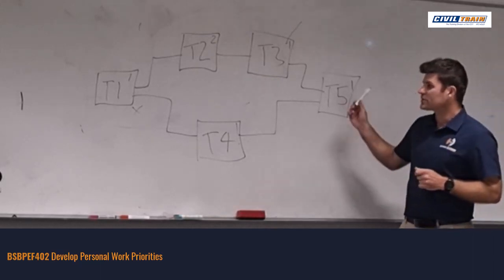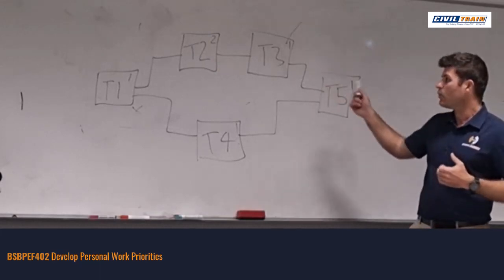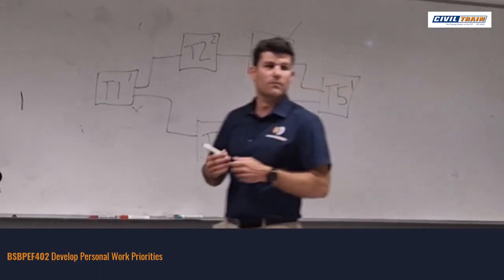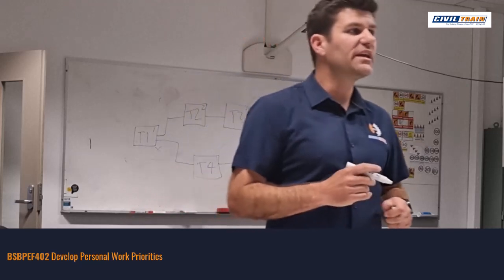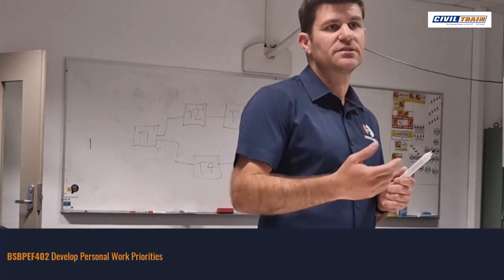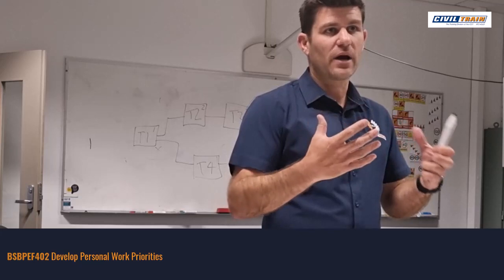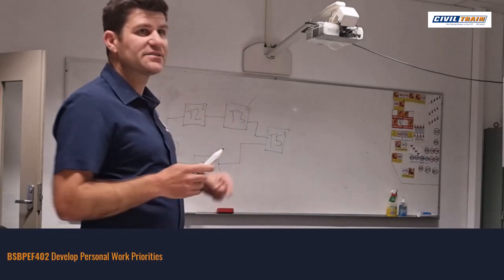So all a network diagram is, it just visually shows what tasks we've got and what's dependent on what. The precedence diagram is the next level of information where we start putting in dependency lines, timings, and actually calculating a critical path. So the precedence diagram lets us calculate the critical path, which identifies the key tasks that need to be done to ensure that we finish on time.